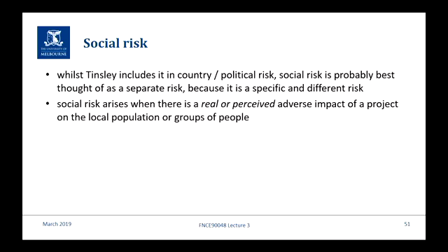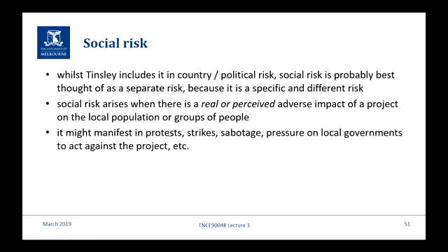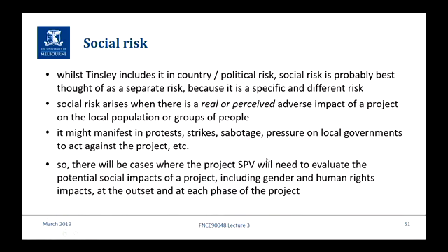That's real. But there's also, and equally powerful, a perceived impact. We don't want this project here because it's going to disrupt our lifestyle. And so the social risk is that there's a group of people and they start agitating more and more, this project's no good for us, and they start striking or sabotaging, that sort of thing. So the problem is, once the risk arrives, even as a perceived risk, protests and strikes and sabotage, all those things that we spoke about, then arise. So they're country risks, but they're country risks that are driven by the perceived adverse impact on local populations.